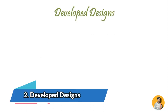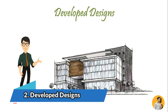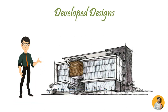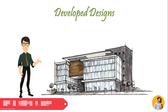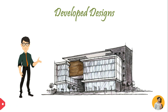Second is developed designs. Draw out the development designs. Discuss the materials used: cladding, flooring, roofing, windows and doors, interior fittings and fixtures, power points, cables, jack, exterior tabs, location, light location, attic access, and use a quantity surveyor to estimate the cost of the project.